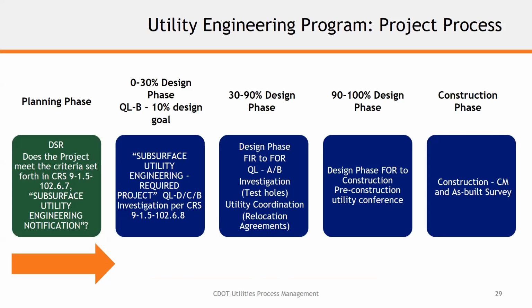So again, early and often communication with utility owners is key, and just emphasizing how much utility coordination is happening in the planning phase, and how much information gathering is going on, because once we move into our design 0 to 30%, all of this planning has to be in place, all the contracting has to be ready to go, because of how we take off from 0% design to 30% design, things are going to start moving rather quickly.